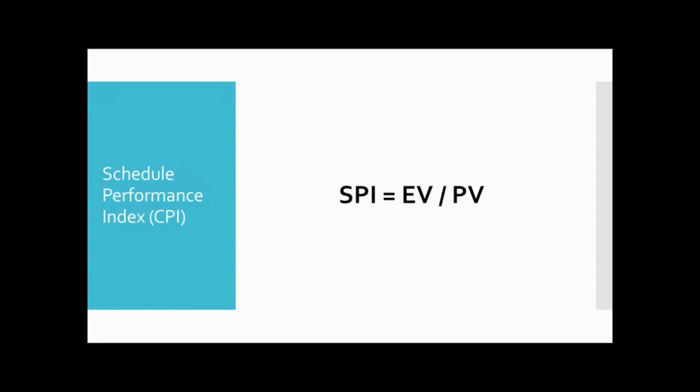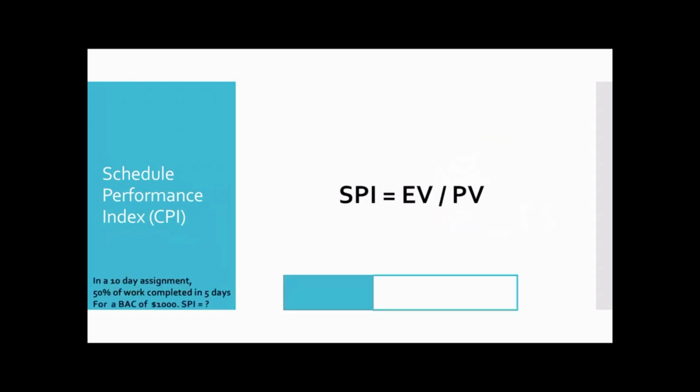Similarly, you have got SPI. So SPI is EV by PV. In index, you get the divide sign. In variance, SV is equal to EV minus PV. So EV is always first. In schedule variance, you get the PV. So in variance, you have the minus sign. In index, you have the divide sign.